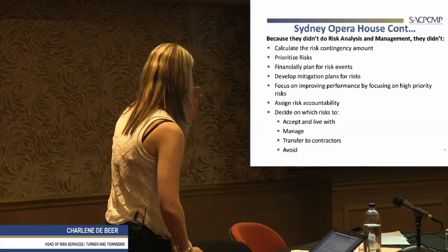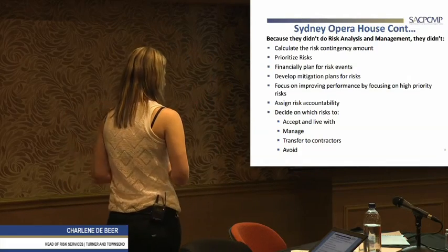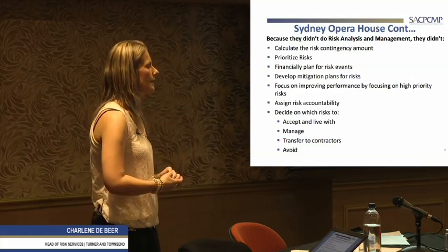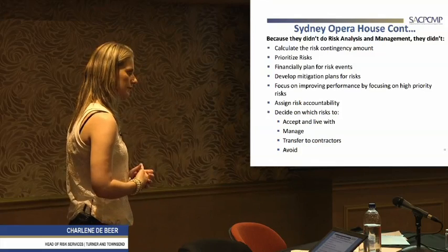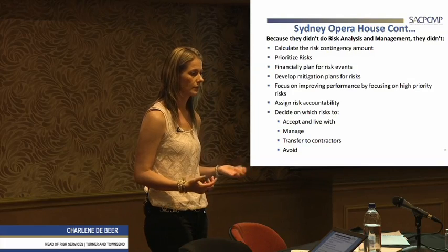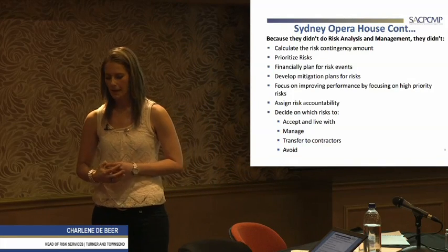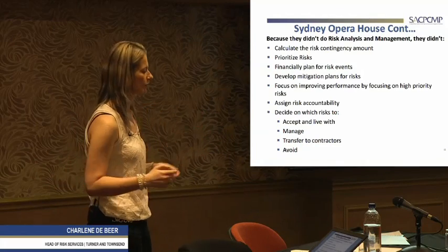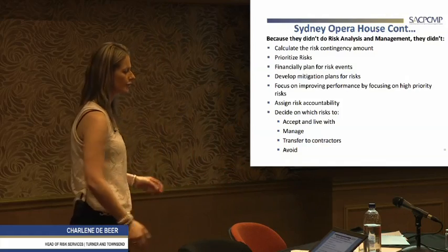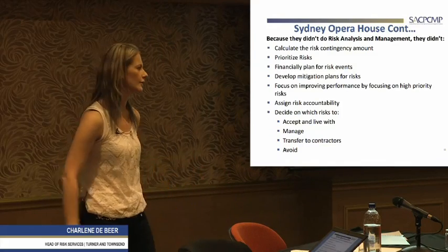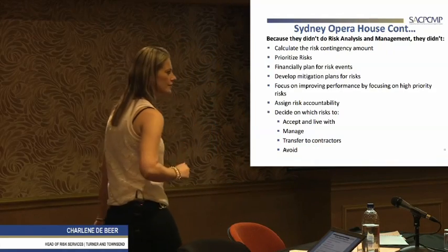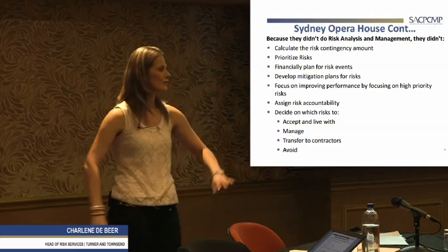And then from a risk point of view, when we look at threats, and we'll go into a bit more detail around how we treat opportunities and how we treat threats, is we can either accept and live with it. And I say, well, there's nothing much we can really do about strikes in the country, because we actually term it in construction now, it's the seasonal strike, we call it. So it kind of starts here from May, June, July, August, and then we know, okay, we'll be safe again until January, and then everybody goes on holiday season, everybody's happy and it's Christmas, and then by May NUM is on our case and everything.